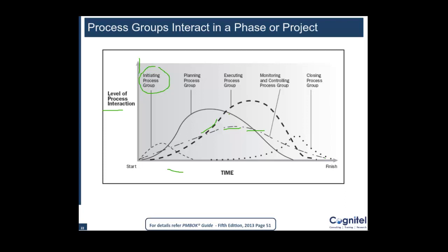Then execution finishes, and that's when you can see the closing process group. Closing was not there up till this point, but once you are doing execution you might have produced certain outputs or deliverables of your project that can be delivered alone — they don't need to be delivered only at the end of the project. That's why closing has started interacting, because certain outputs might be delivered to the customer as and when they have been produced. The major closing, of course, comes towards the end of the project, and then the project finishes.